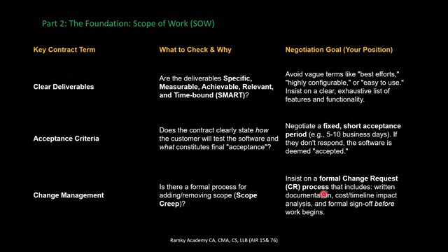And change management: is there a formal process for adding or removing scope? Yes. So insist on a formal change request process that includes a written document, cost and timeline impact analysis, and formal sign-off before the work begins. Before any work starts, the terms and conditions of the contract should be included properly, signed, and agreed by both parties in order to safeguard their interest.